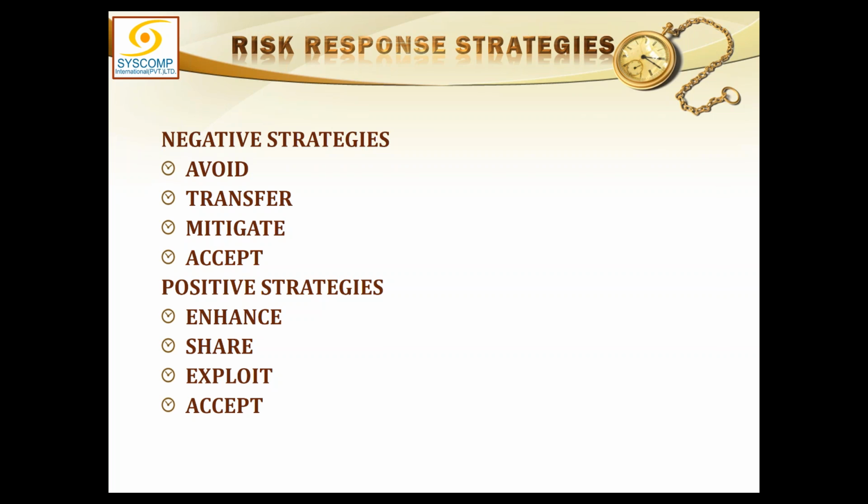In exploitation, I would like to increase the probability of the opportunity or the amount at stake. You see, if you are at a casino and you are playing a game there and you are sure to win, you are 100% sure that you will win. Will you not like to exploit this opportunity and put in as much money as you can?